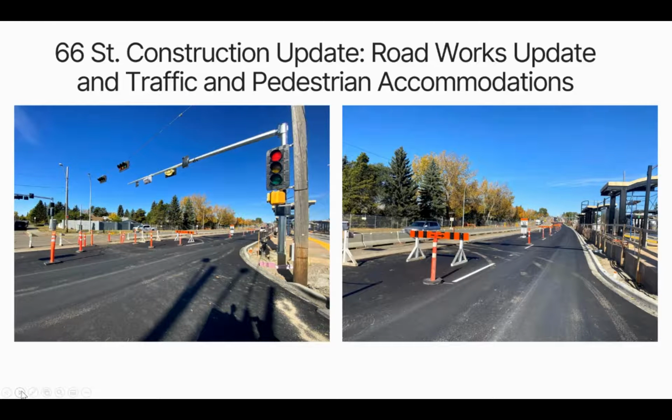It is the area where we are building rail first. It is the area where we do a lot of our very initial commissioning, and Eric's going to talk about that shortly. And it's also an area that had some pipeline corridors that we had to cross as well, which caused duration. Basically, it just takes time to do the work around many, many pipelines that we had to cross. So all of this combined with just making sure we keep traffic open has created a fairly long duration of construction in that area. And we're well aware of that, and we are working hard to get out of that neighborhood as soon as possible and get things back to a final condition for you.